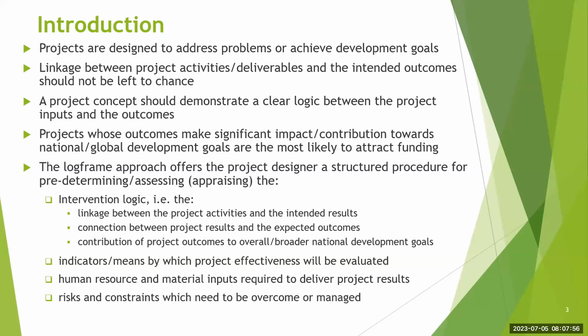I know for the European Commission, it's almost something mandatory. As part of the application process, you would need to demonstrate the intervention logic, and it's almost something that you always have to do, to add a logical framework which clearly shows how your intervention is going to contribute to development.